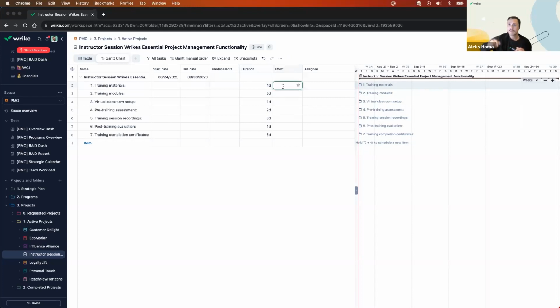I'm going to go pie in the sky, say something like 12 hours, right? 12 hours over the course of 4 days, that's 3 hours each day. That's how Wrike will literally just determine whoever's assigned to that particular task is going to get 3 hours accordingly.